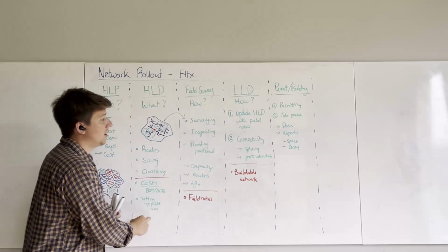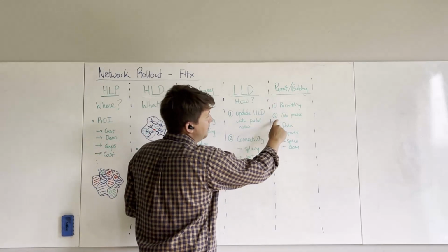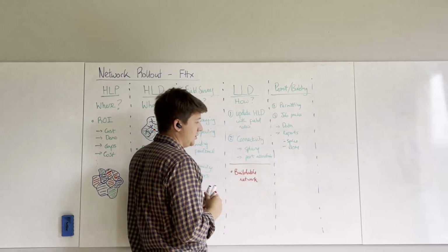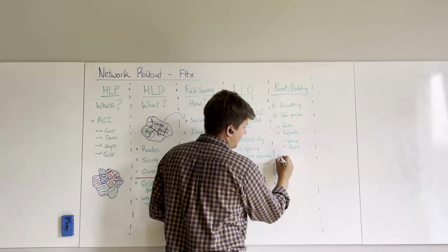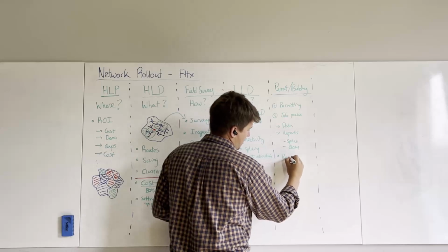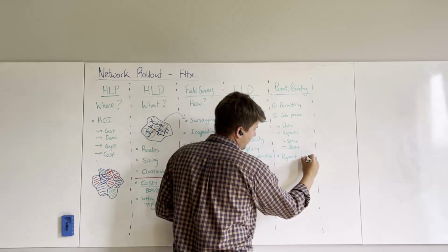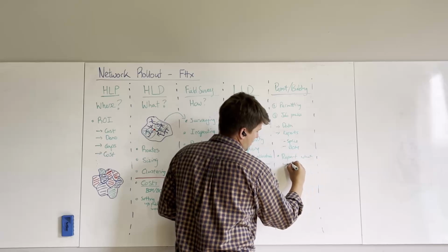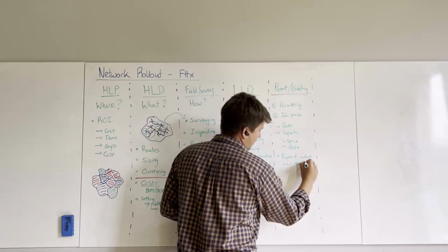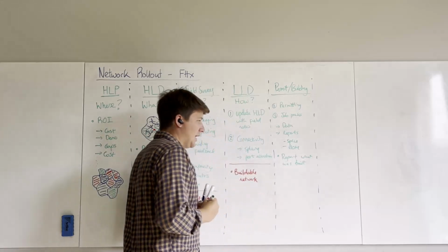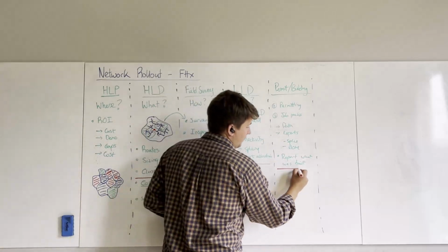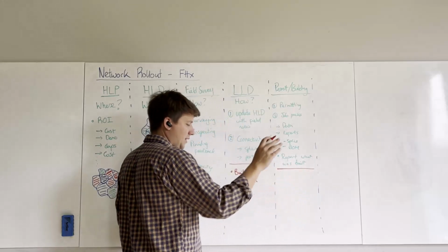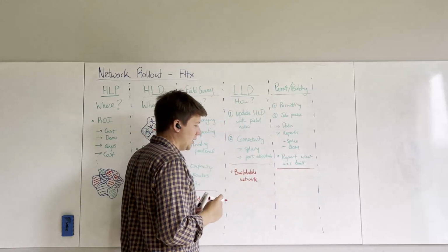The final thing is we need here set up field work. We need to also give this build team access to report back on what they've done. Report what was built. This is quite often overlooked, but it's really important, especially for the next phase. If you don't streamline that, then you can cause issues down the line.